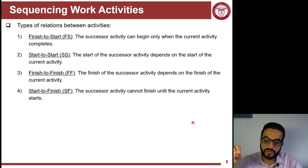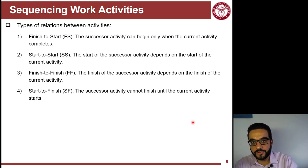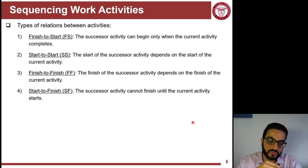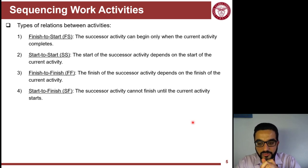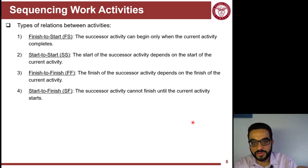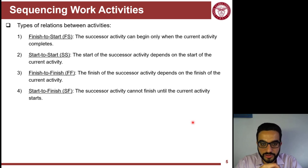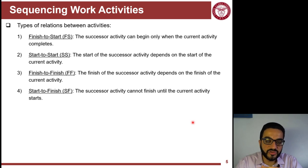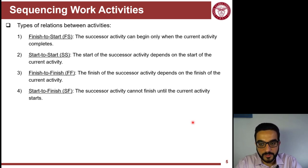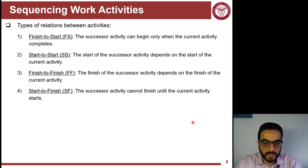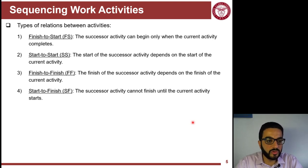Finish-to-Finish means finishing the predecessor is required, but there's no start-to-start relationship. Start-to-Finish means you must start one activity to be able to finish another. Most schedules use Finish-to-Start as it's the simplest way to represent logic — somewhat conservative, but the most common. That is what we'll use and describe in this lesson.